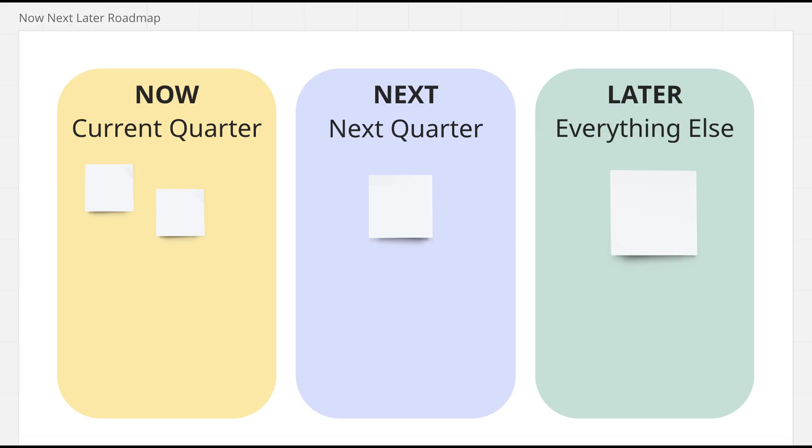I usually try to use a now-next-later roadmap. For me, now is what we are working on in the current quarter, next is the next quarter, and later is everything else. I have never seen a detailed plan longer than one quarter that stood the test of time. Usually those plans are one week after we define them and they are already obsolete.